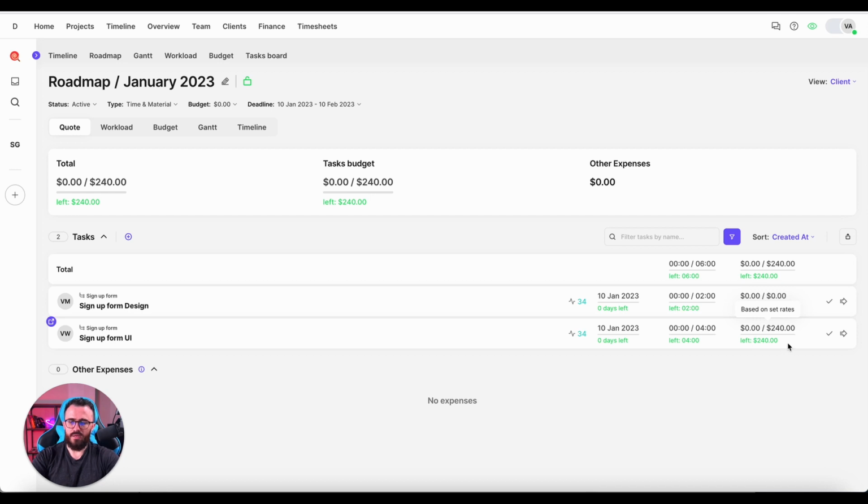If you remember, this worker has $60 per hour, and 4 hours means 240. Now if I switch to company, it still shows that amount, because it's important for us to understand the whole budget. But once the time is tracked, let's say for 1 hour, I will see 50 here. If I go to client, I will see 60. So every actor in the system sees only relevant information to its case. This is a basic sort of functionality of calculation. It also shows total here.